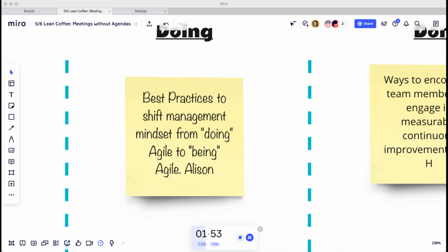Just the reason why I've done several large-scale Agile transformations, and I know a lot of organizations say start grassroots, right? Pick a team, go pilot, and all of those are great ideas, but I actually prefer to start with middle management. If you're going to do a pilot, start with the middle management of the pilot first, and then work your way to the team, right? Because middle management can for sure sink a whole transformation. They can undo all of the being agile stuff very quickly if they don't understand their new role.